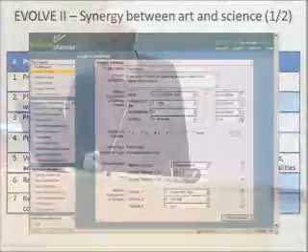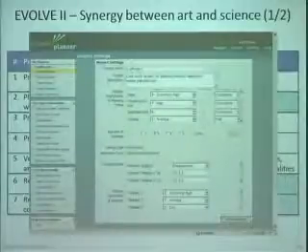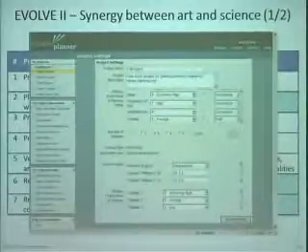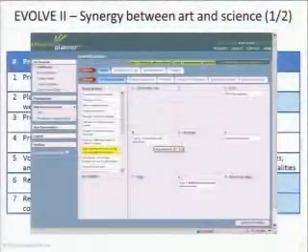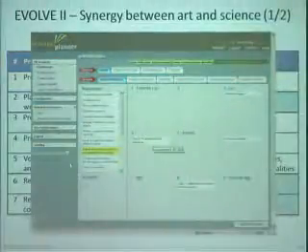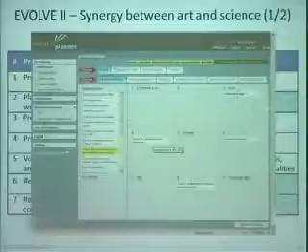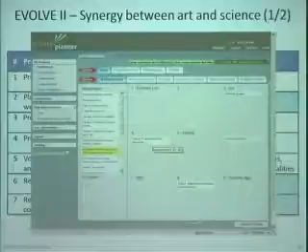And so that is the whole idea of Evolve 2. It's very much stakeholder-centric, and you'll find here some snapshots from the tool, how these processes are supported. So this is about the selection of criteria, and you find here there are different criteria, and they have a different level of importance, and you can score on them cumulatively or non-cumulatively. You have here the actual scoring process where each stakeholder is asked to categorize a candidate requirement or feature among 9 different levels of importance.